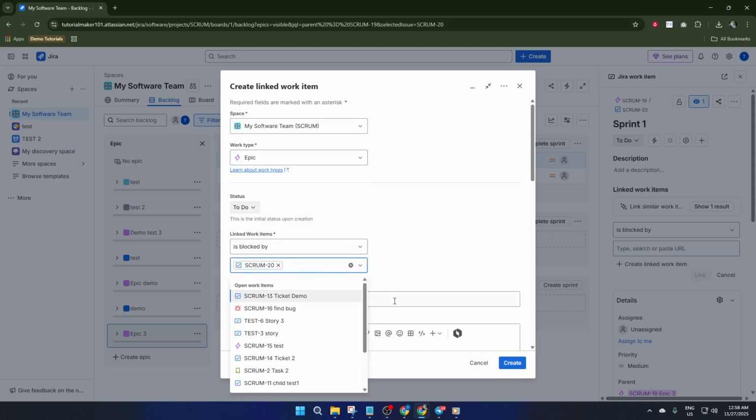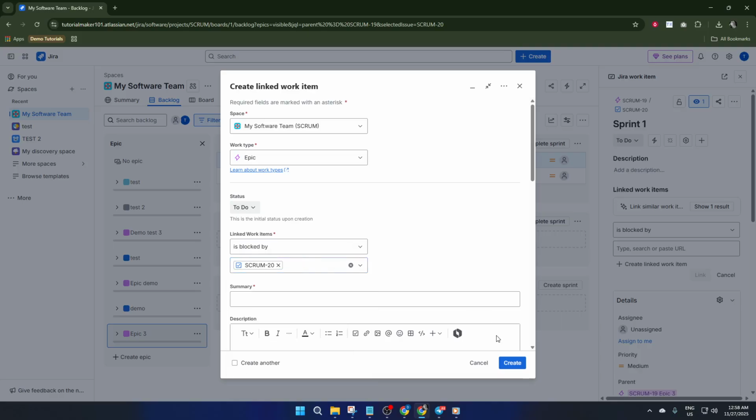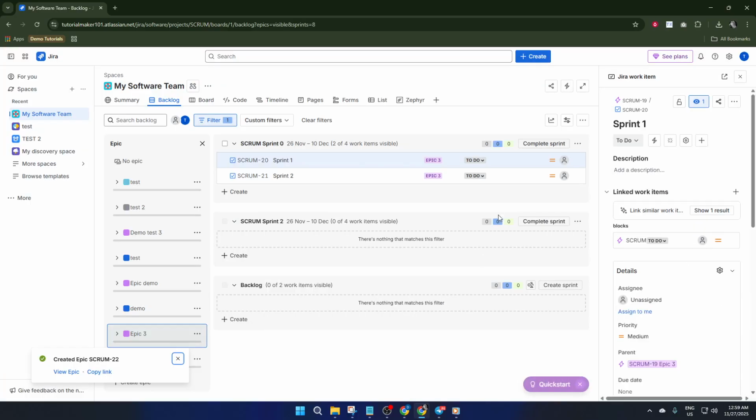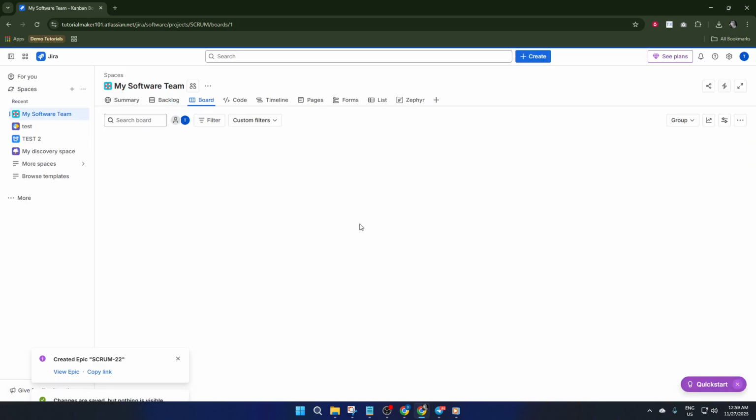Next up is committing and syncing your progress in Jira. Always include comments in your commits, especially the Jira ticket number, so anyone checking the Git history knows exactly what work relates to which ticket. As you get things done, move your tasks across the Jira board, from in progress to done. This might seem like a small admin job, but it's crucial. Keeping your tasks updated lets your teammates know where things stand, avoids duplicate work, and keeps stand-ups quick and focused. If your board starts looking chaotic, don't worry, it's normal, and regular updates help keep everyone on the same page.